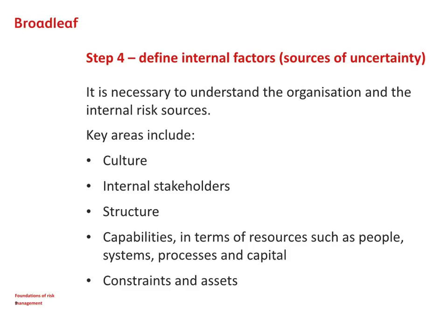Areas we should consider in terms of internal sources of uncertainty, internal risk sources, are things such as our culture, other groups and teams within the organisation, the structure, our capability and resources, and any constraints that we have to deal with, our procedures and policies, and the extent and limitations of our assets.